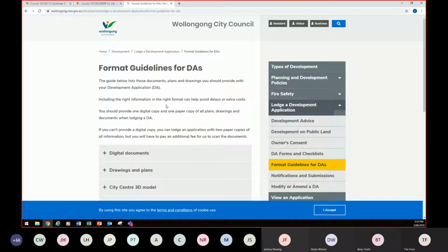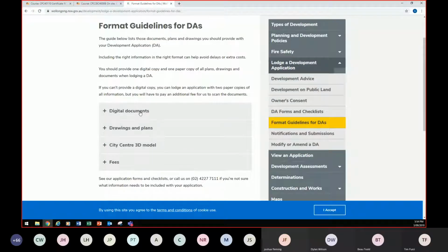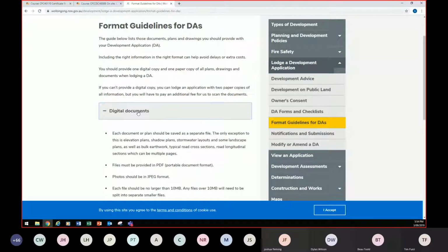Okay, if you submit your plans to council and they aren't in the correct format, they just return them to you. They don't make do if the scales aren't correct, if the drawings aren't correct, if the title box isn't correct. They're not going to fiddle around with it. They just send it back to you after it's sat on the desk for probably 3 weeks. So your job then is 3 weeks behind. So you're better off to try and familiarise yourself with exactly what they want.